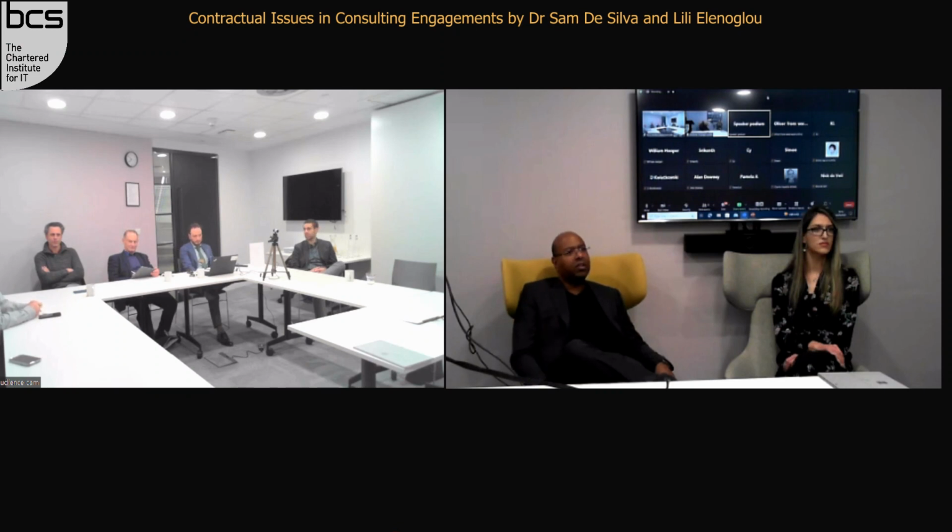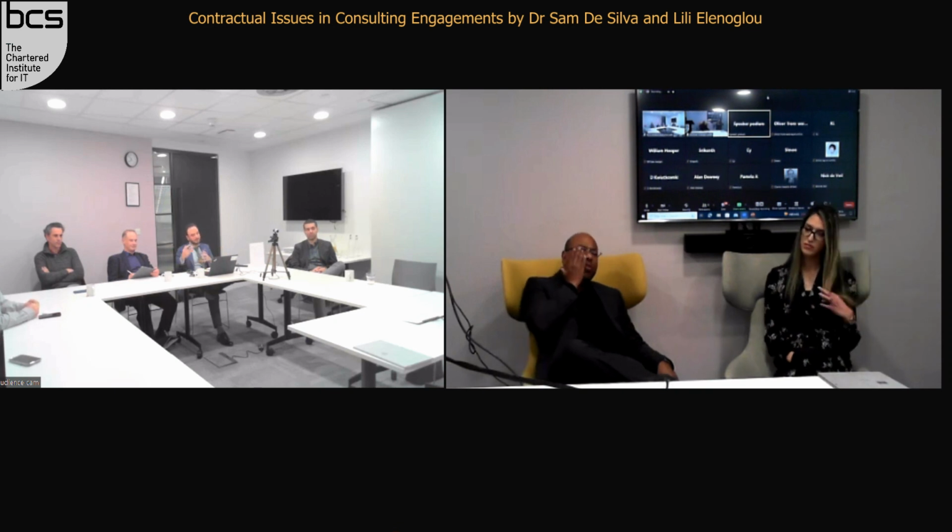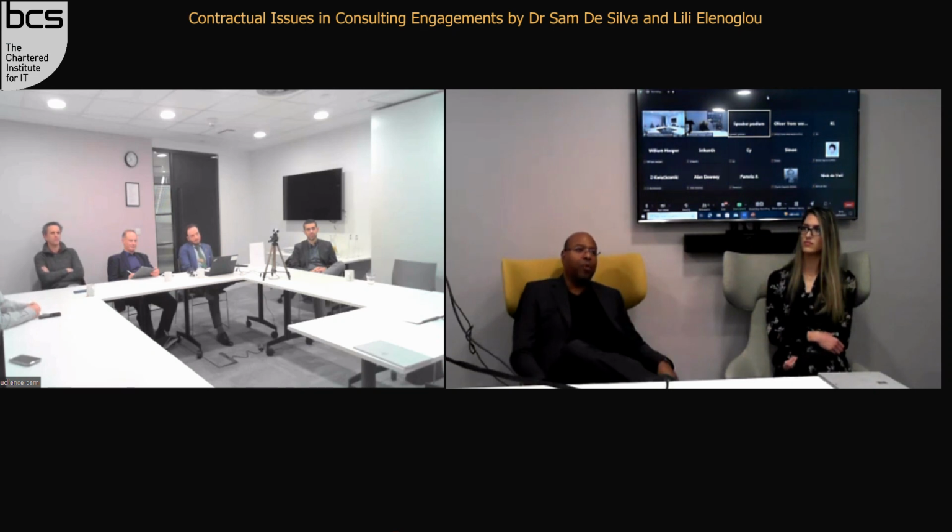Is that what we would call a time and material services contract? Yeah, but you just need to make sure the scope of work is generic, basically in a way that there's no way you can be caught out on guaranteeing any kind of outcome or any deliverable. What happens if you want to go fixed price, instead of by time and material? Well, the thing with the fixed price is often clients will want fixed price, but they'll also want an outcome. They won't just say, fixed fee for what? They will want, you will deliver this piece of software or this report for a fixed fee. So that's where you will have an outcome.